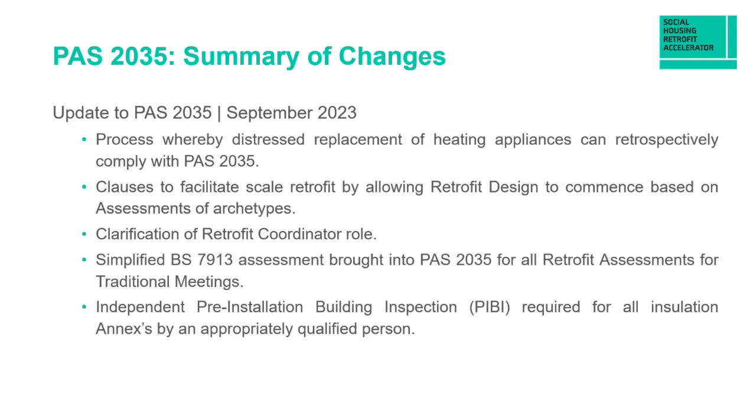A new process has been introduced for the distressed replacement of heating appliances. And what does that actually mean? So it really introduces a process where you can have a boiler replacement. For example, your boiler's broken down, or a property that you look after, the boiler's broken down and you need to replace it pretty quickly. Say it's midwinter. You haven't got the time to get a retrofit coordinator on board and try and get all the PAS compliance, retrofit assessments, etc.